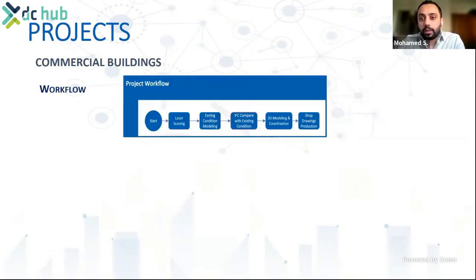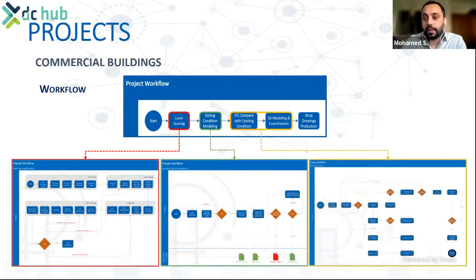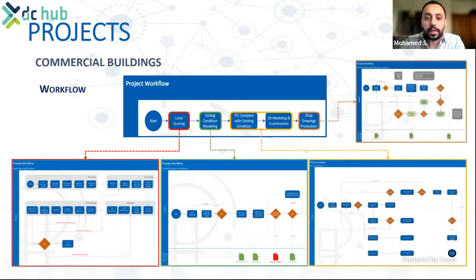The as-existing BIM model is compared with IFC regarding interface points and system continuity. Based on this study, and in case of any deviation, a building element can be either demolished, rebuilt, or redesigned according to the existing condition.